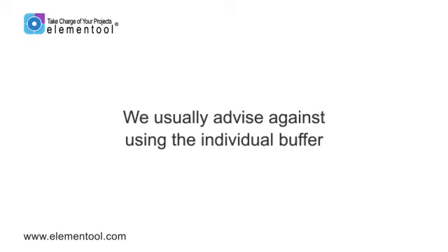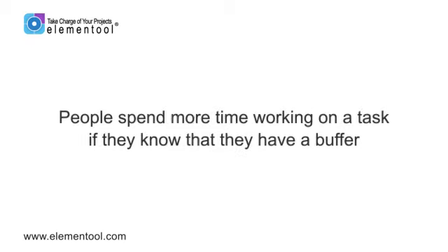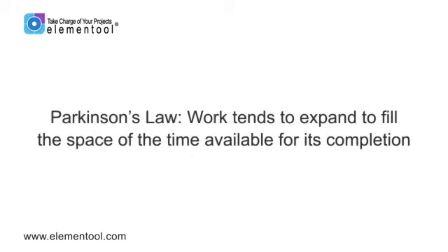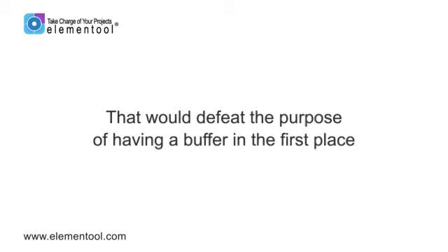At Elementool, we usually advise against using the individual buffer because people have a habit of just spending more time, even when they don't need it, working on a task if they know that they have a buffer to give them extra time at the end of it. As Parkinson's law states, work tends to expand to fill the space of the time available for its completion. And that would pretty much defeat the purpose of having a buffer in the first place, wouldn't it?